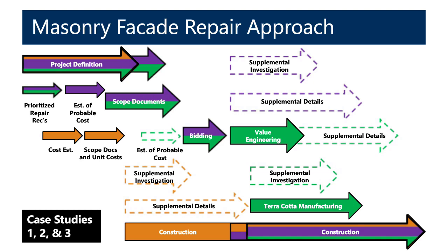But again, the approach here of the design repair is to not have too much upfront time and kind of move more into construction as early as possible in order to get all the unknowns done and get the process going, pull pieces for terracotta replacement. Sometimes there's mixed trades, so you're going to have window subs on there to do work, and so you have to use scaffolding by 2 different companies if you want to coordinate that. Again, there's a lot to take in on this slide, but it shows just how every project is unique based upon owner and building needs.